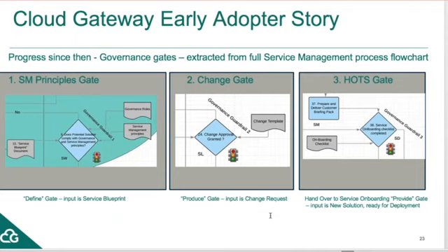But then we have to get to a point where, before our DevOps and NetOps people start on a 2-week agile development cycle, I want to say, well, hang on, let's make sure these guys aren't wasting a bit of time and effort. Let's have a ServiceNow change record as the audit trail of that point we've reached, and we'll call that governance guardrail 2. And so the input will be a change request.